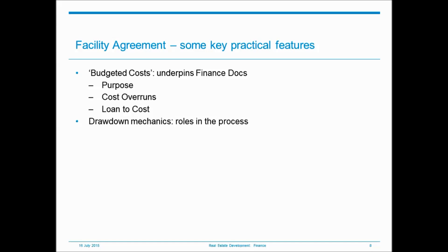Any development finance facility, including the LMA standard, will have reasonably detailed provisions on the mechanics surrounding drawdown. The SPV wants to pay development costs by drawing under the facility; the bank wants to be comfortable it's appropriate to advance the requested drawdown. The relevant LMA provisions involve the supply to the bank of the utilisation request plus various supporting documents — invoices etc. — a certificate typically from the employer's agent on behalf of the SPV, and a sign-off from the bank's project monitor confirming it's comfortable the drawdown should go ahead. It's a good idea to make sure all concerned in that process have seen and understand the relevant provisions in the facility agreement.